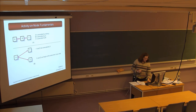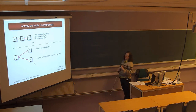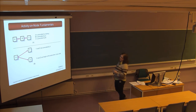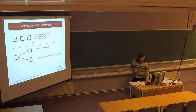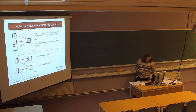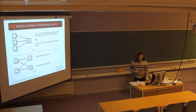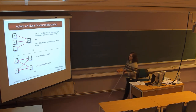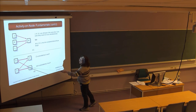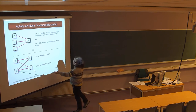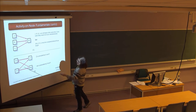For activity-on-node fundamentals: A is preceded by nothing; B is preceded by A; C is preceded by B. You can have X which bursts into Y and Z, so Y and Z are both preceded by X and can happen at the same time. Then you have merges: J, K, and L can all happen at the same time, and M is preceded by J, K, and L — they must all be completed before M can begin. Crossovers are also allowed, where a node can be preceded by activities from different branches.